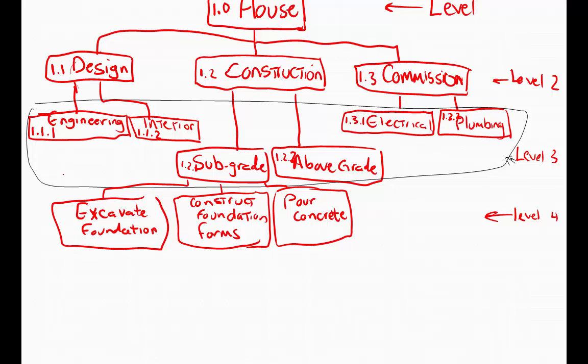So the excavate foundation work package would be, again, following the same numbering that we've got to here. This work package would be numbered 1.2.1.1. Construct foundation forms would be 1.2.1.2. Pour concrete would be 1.2.1.3.